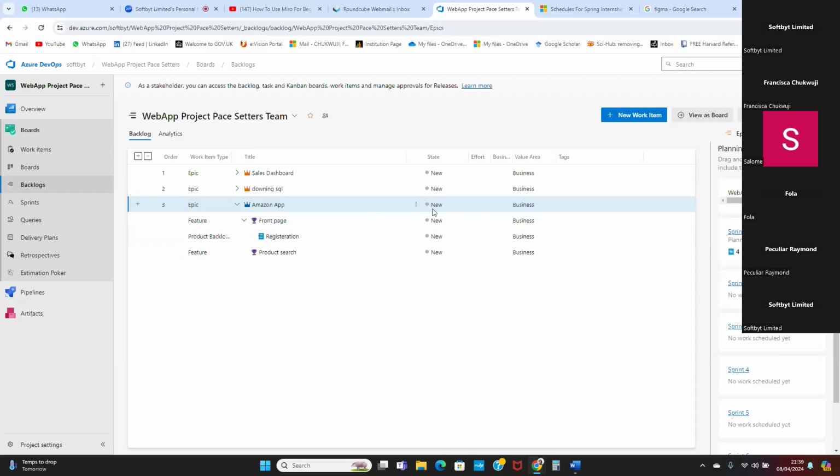which will have everything in it. So for this particular project now, does each epic represent a sprint? No, each epic represents a task that can extend for maybe several months. Then each of the features will now represent the sprints, I guess? No, each epic represents a task. Each feature represents a sub-task of that main task.